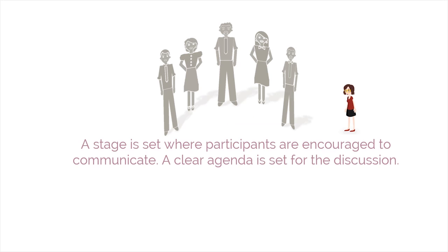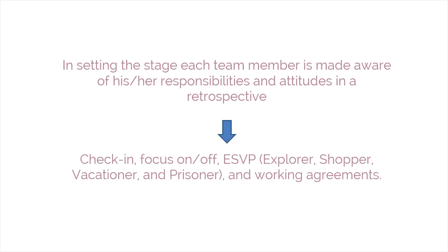A clear agenda is set for the discussion. In setting the stage, each team member is made aware of his or her responsibilities and attitudes in a retrospective, which are check-in, focus on, off, ESVP, short for explorer, shopper, vacationer, and prisoner, and working agreements.